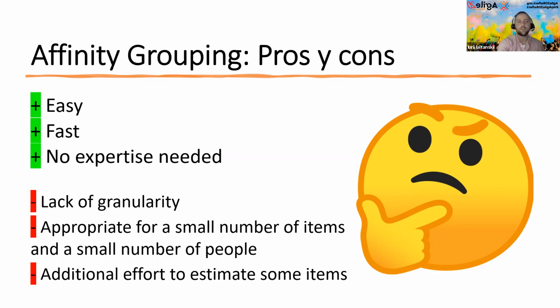But the Scrum Master's job is to pay attention to that and talk to the team. Schedule meetings to check and compare at the end of the sprint, or maybe during the retrospective could also be an option, to see whether it was fine and accurate, or it was a complete disaster, which could be the case. Learning these lessons would help the team to improve the accuracy of their estimates.